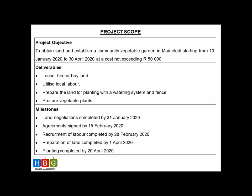First, what needs to be done — obtain land and establish a vegetable garden. Second, where must it be done — in Mamelordi. Third, when must it be done — that's your project timeline, from the 10th of January to the 30th of April. And fourth, how much is it going to cost — in this case, not exceeding 50,000 rand. Make sure you have at least those four elements in your project objective.